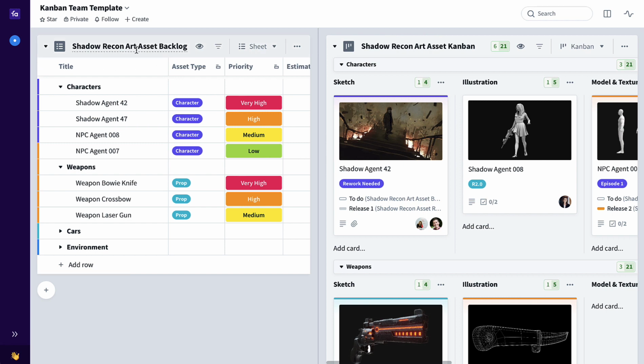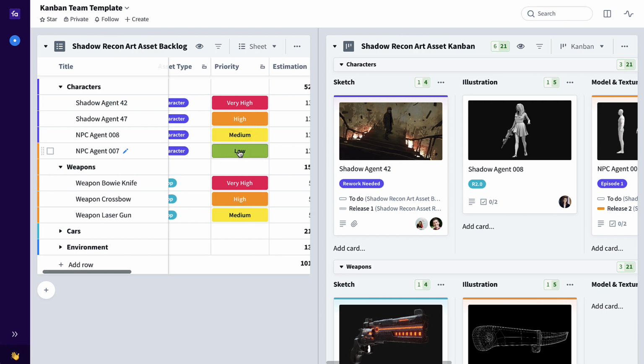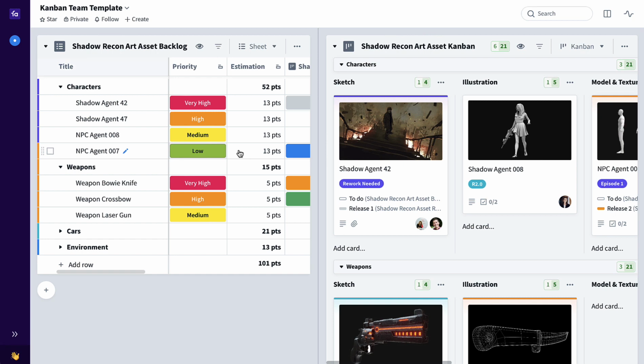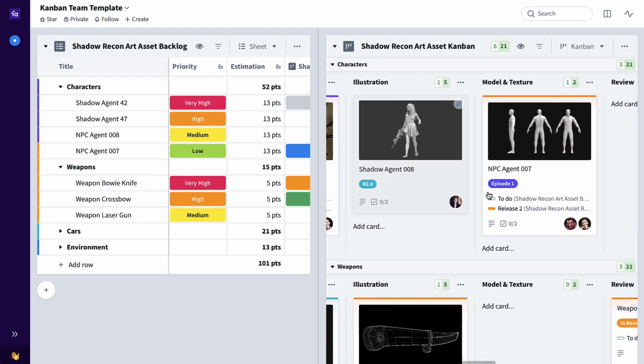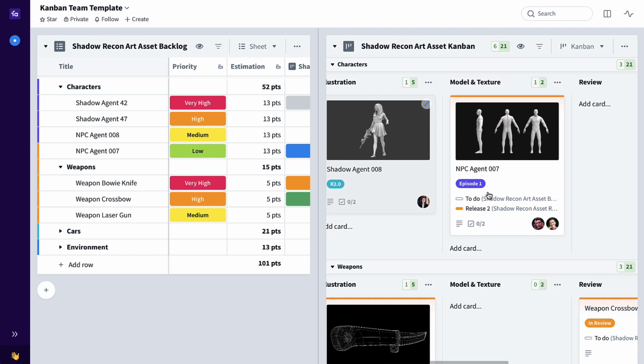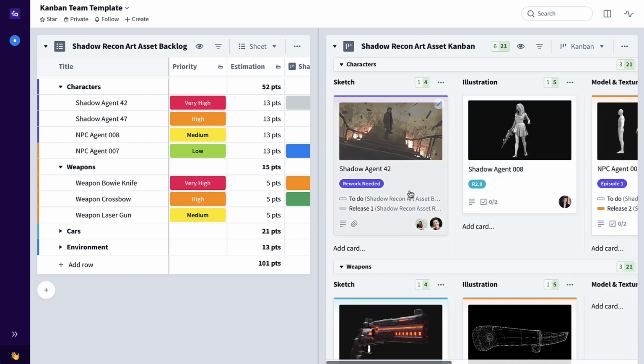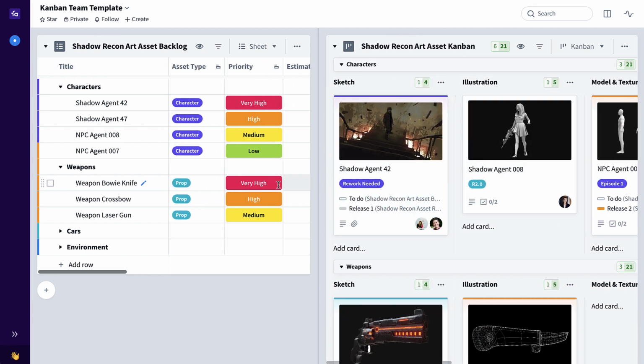This template includes a product backlog for the organization and prioritization of work. Product backlog items should be right-sized, meaning they are all relatively the same size, which ensures a stable flow through the included Kanban board. Feel free to change the stages of this Kanban board to meet your needs. Let me walk you through an example.